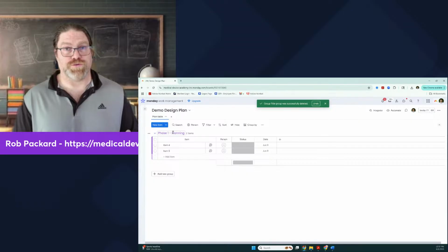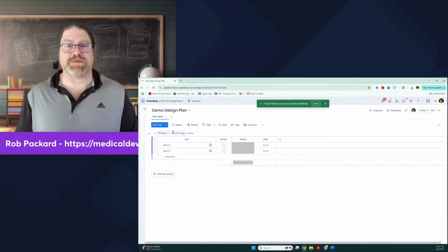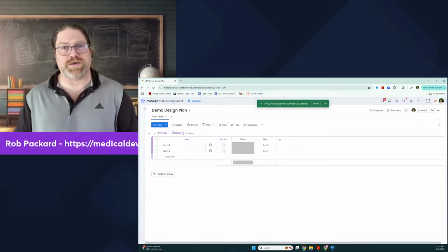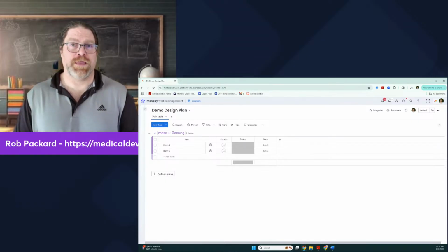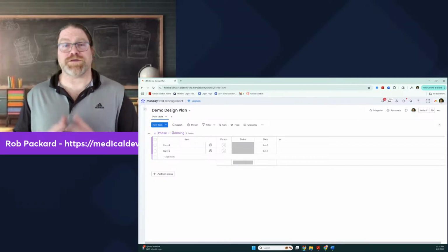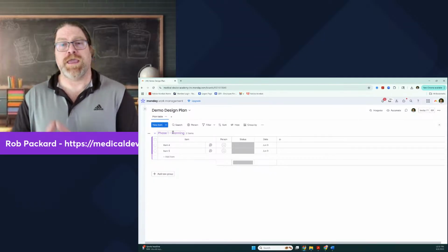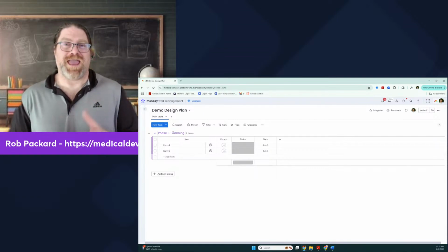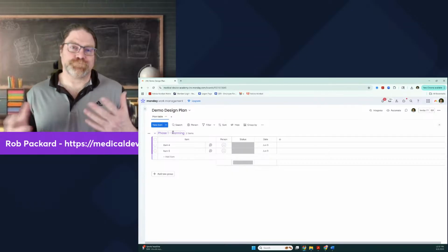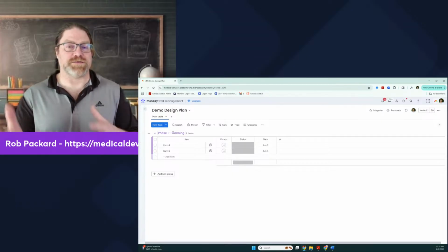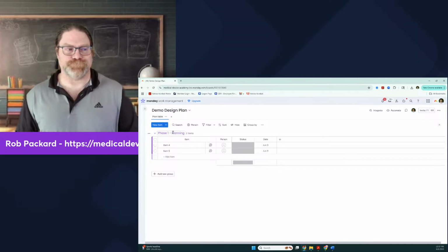It's really old, but it's a stage gate process, and the gate that you have to pass through is regulatory approval. So you have no choice but to at least have one gate, the regulatory approval. And probably the second gate that you absolutely have to have is release of the product. So if you're going to have a gate for regulatory approval and a gate for launching the product commercially, everything prior to that could be iterative. So that's why we say this could be a hybrid process up to the point of regulatory submission.